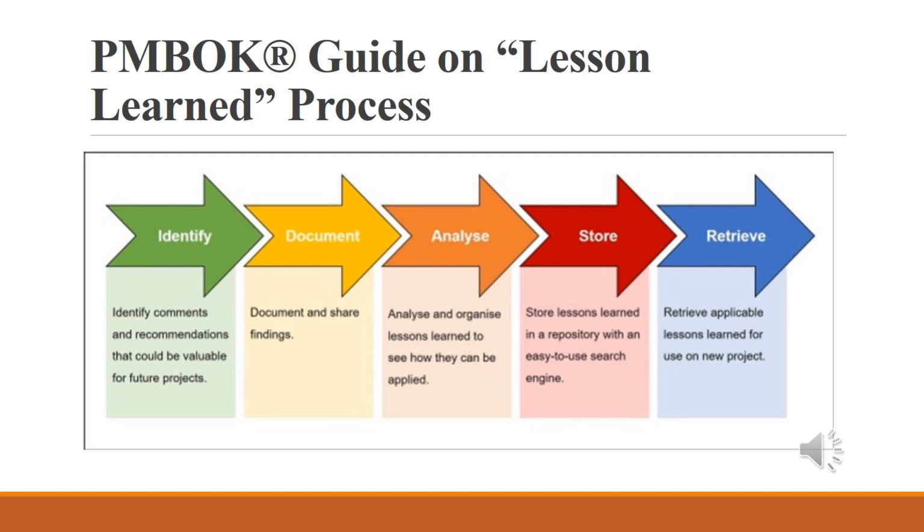The emphasis in PMBOK is to not just generate findings, but to store the lessons learned in a repository that is easy for others to go and look at, because they hope that other people can benefit from the lessons that you have learned from your project. So the next video will show you how to generate lessons learned using the PMBOK format.